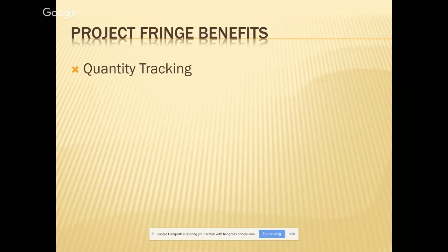So how do I use this? So before the job, generally we perform takeoffs. And I'll do a takeoff on a wood frame building on all the lumber, on all the siding material, how much roofing material there is, anything that I'm going to be paying for in part or in whole without a contract. On a tower, it's going to be concrete, and it's always concrete. And that's my biggest indicator on how far along we are.